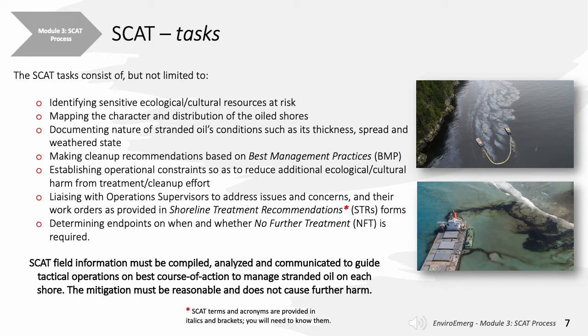Throughout the course of an incident, you will be liaising with operational supervisors to address issues and concerns they raise in their work orders, as provided in shoreline treatment recommendation forms. As well, you will be determining whether or not endpoints have been reached and whether no further treatments are required. All the SCAT information that you gather in the field and the work process must be compiled, analyzed, and communicated to guide tactical operations and to command on the best course of action to manage stranded oil on each shore. And this is done by shore segment at a time.